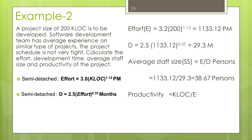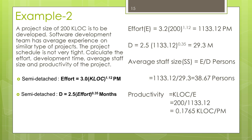Productivity is equal to KLOC divided by effort. Here we have 200 KLOC and effort is 1133.12 person-months. Substituting these values gives a productivity of 0.1765 KLOC per person-month. This can be converted to LOC by multiplying by 1000, so the final answer for productivity is 176 LOC per person-month.